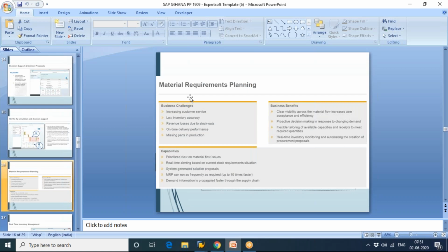Instead, if my procurement process takes 10 days, and with shipping and import export it reaches my plant after 20 days, and then I need to send it to the customer, that is a 40 days lead time. We don't know what can happen in between, correct? Like this COVID, we cannot do anything. So with SAP HANA analytics, we can reduce the inventory timings.